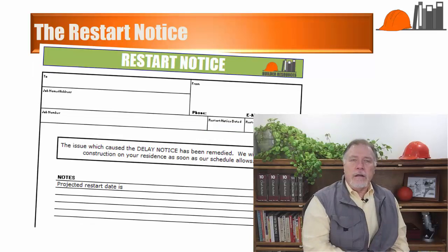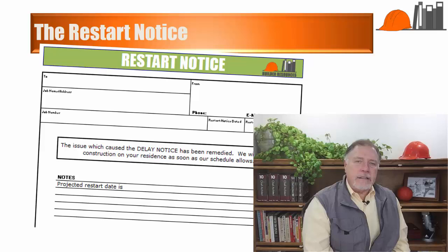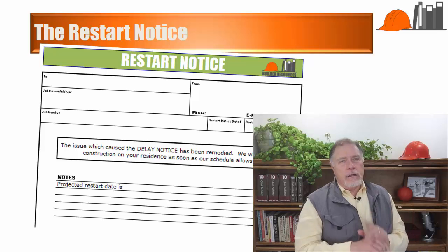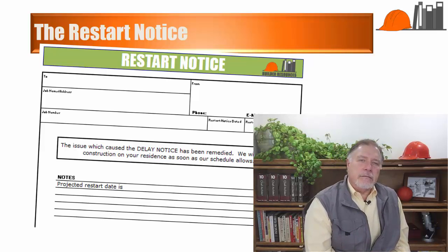And then the final document is the restart notice, which offsets the delay notice. It indicates that the problem has been resolved. It also provides project restart information and summarizes the new extended completion date for the project.